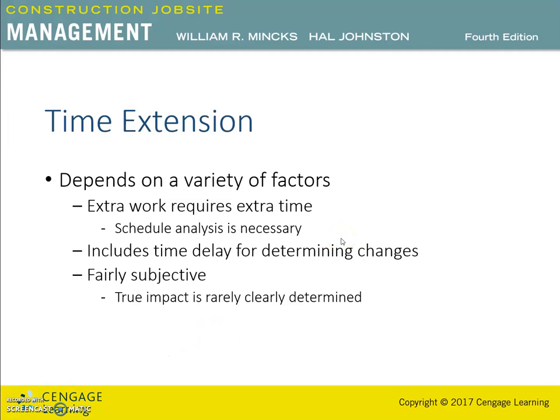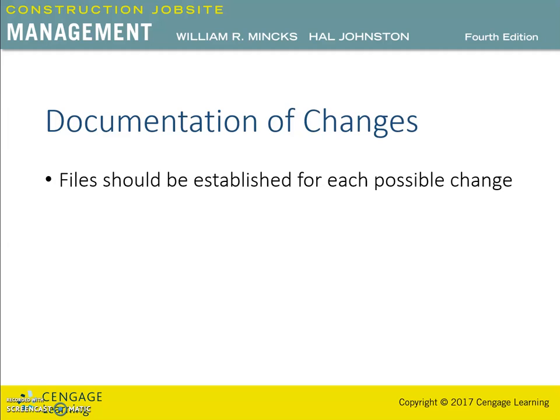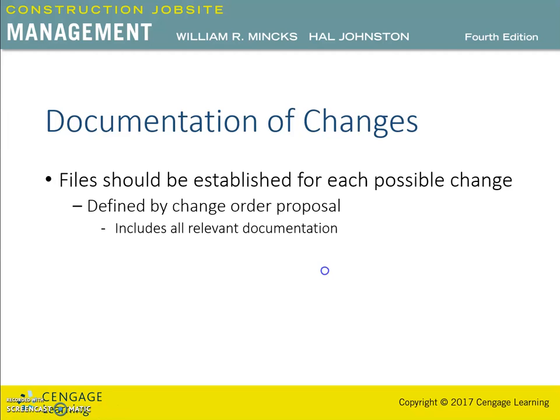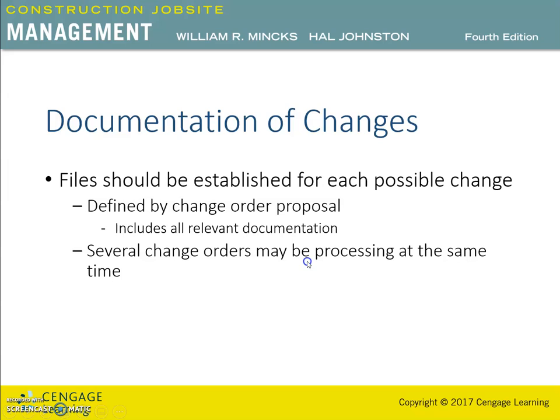Since we are talking about the changes, and this change process is to be managed, a lot of documentation is needed for managing it. Therefore, files should be established for each possible change as defined by the change order proposal. This file should include all relevant